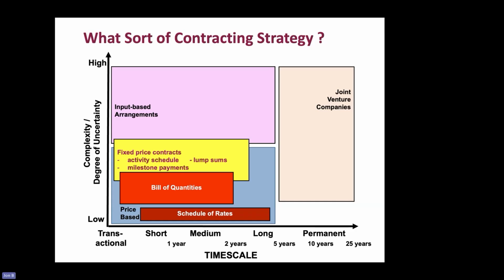If there's only 10 milestones for achieving 10 things, and pretty poor programming requirements, then when change occurs, you have very little flexibility, and very little insight into how the contractor has costed this thing and how they're incurring costs. That leads to a huge bun fight around extras and change, because there's no or very little transparency.